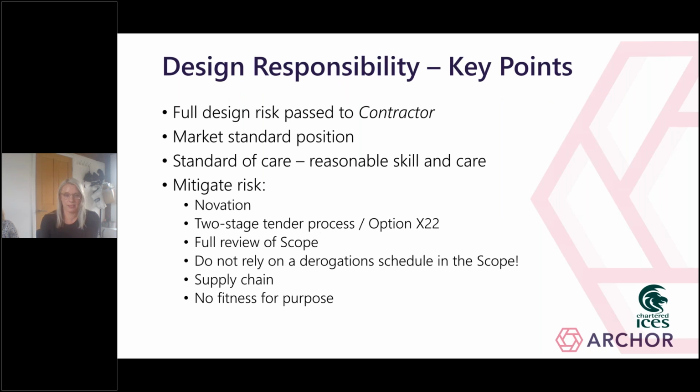So some key points to take away then. Most NEC contracts are amended in a way that makes the contractor entirely responsible for the design of the works. This includes the design that's been prepared by the client, or more accurately by the client's consultants, and that can often be before the contractor has ever had an involvement with the project.